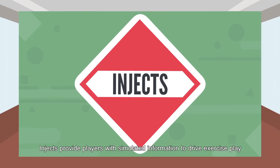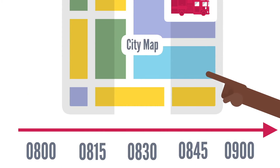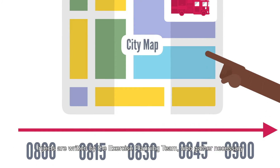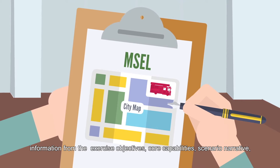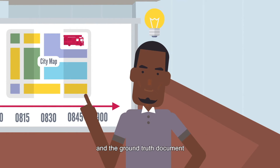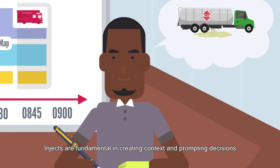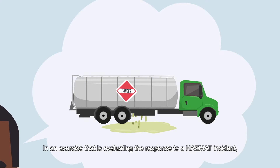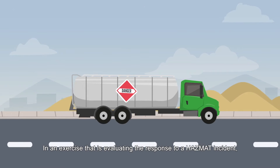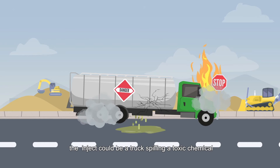Injects provide players with simulated information to drive exercise play. Injects are written by the exercise planning team, who gather necessary information from the exercise objectives, core capabilities, scenario narrative, and the ground truth document. Injects are fundamental in creating context and prompting decisions by all players. In an exercise evaluating the response to a hazmat incident, the inject could be a truck spilling a toxic chemical.